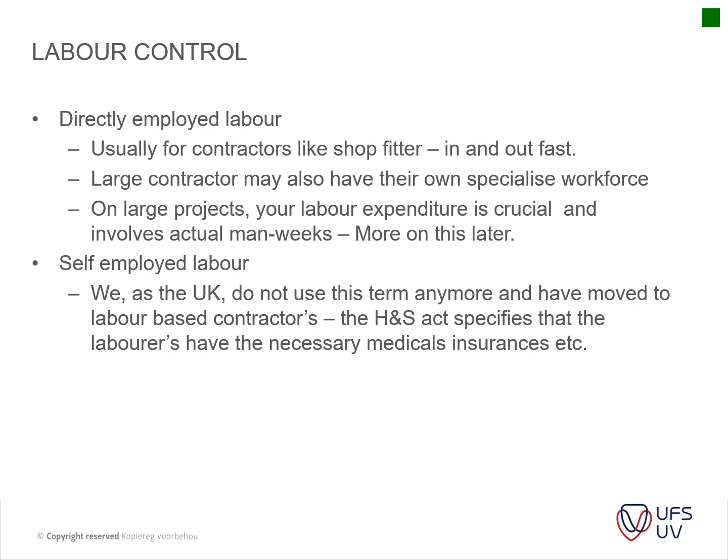And then it depends on the size of the contractor as well, and the location. For instance, if you're a contractor in Joburg and you get appointed here in Bloemfontein, you might appoint a bricklayer from Bloemfontein here just for the project, or a labor only contract for that. Or the other option is to bring that person from there, but then you need to organize lodging and so forth. Whereas if you appoint someone here, he already lives in the vicinity. So that's the type of considerations that you need to think of.